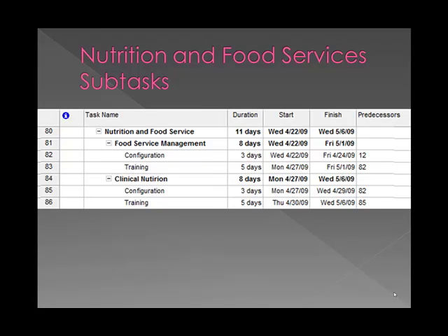Patient information management is also required for the task of nutrition and food services. Nutrition and food services is comprised of the 2 subtasks, food service management and clinical nutrition. Clinical nutrition cannot begin until after the food service management is configured. After a total of 11 days, nutrition and food service tasks will be completed on May 6th of 2009.